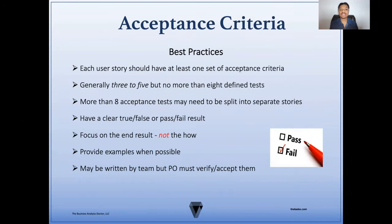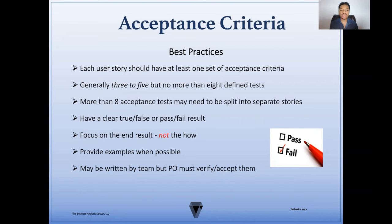Now let's look at some best practices for acceptance criteria. Typically, each story should have at least one set of acceptance criteria, generally three to five statements, but no more than eight defined tests. If you have more than eight acceptance tests, the story may need to be split into separate stories. Also, you want to have a clear true-false or pass-fail result, and always focus on the end result, not the how. Be sure to provide examples when possible. And acceptance criteria may be written by team members, but the product owner or customer definitely needs to be the one to verify and accept them.